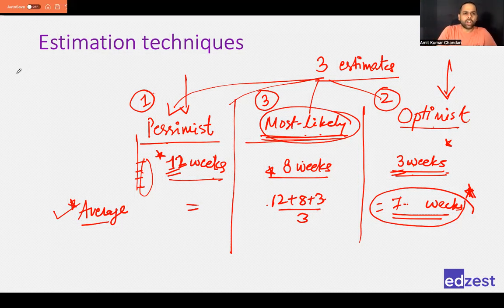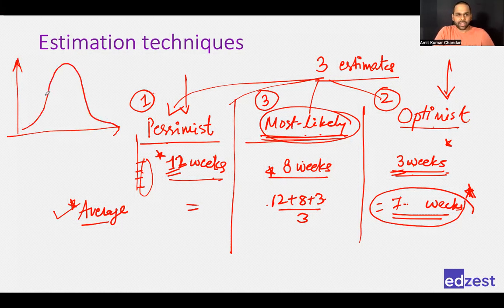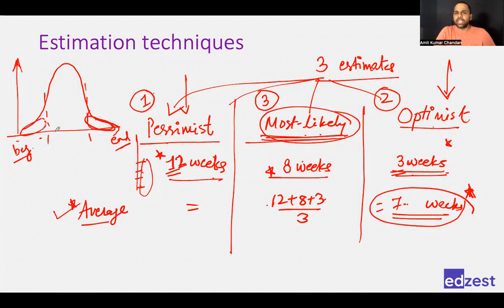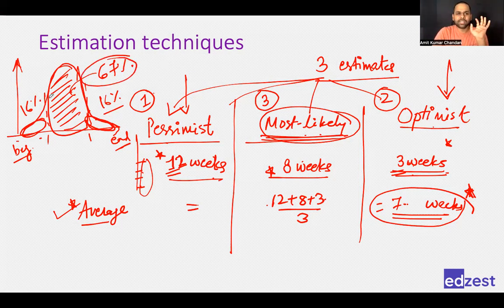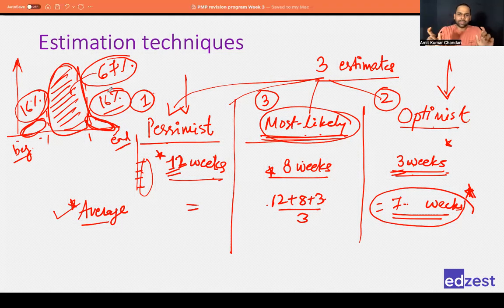We need to give more weightage to the most likely estimate. Through a normal distribution curve, you can see that very little data is at the extremes and maximum data is towards the middle — approximately 67% is the most likely view, 16% is pessimistic, and 16% is optimistic. For example, if you take the height of every person in your city, about 70% of men fall between 5'5" and 5'10", with only 16% above and 16% below.